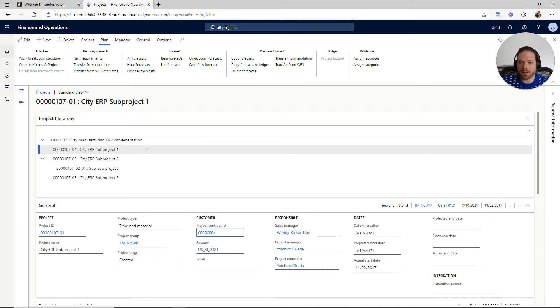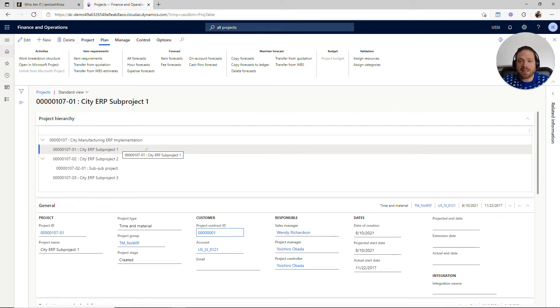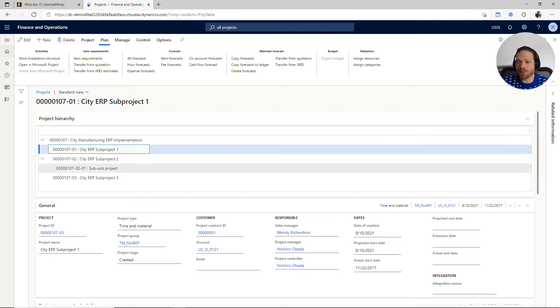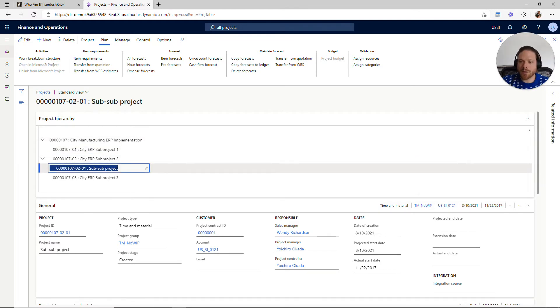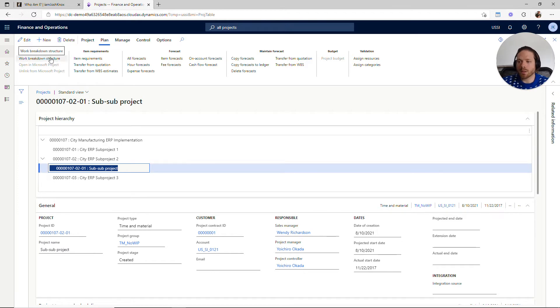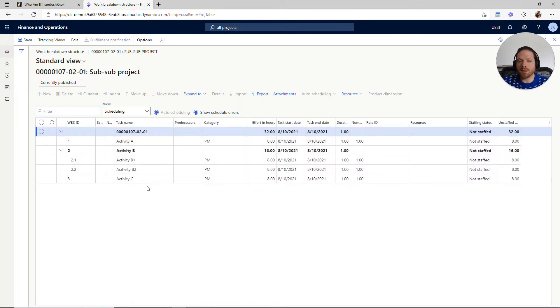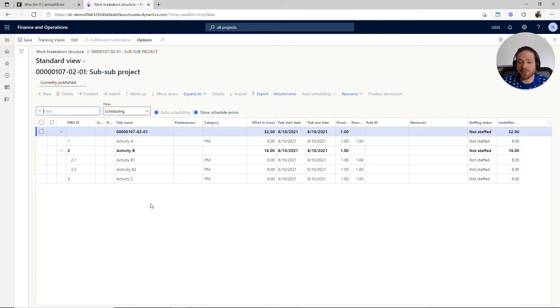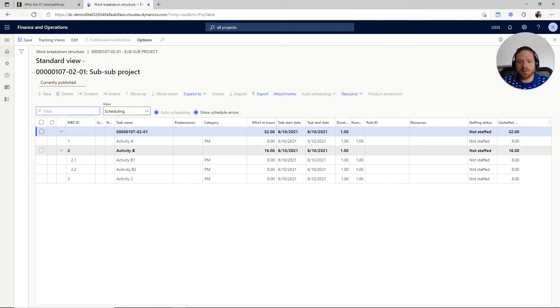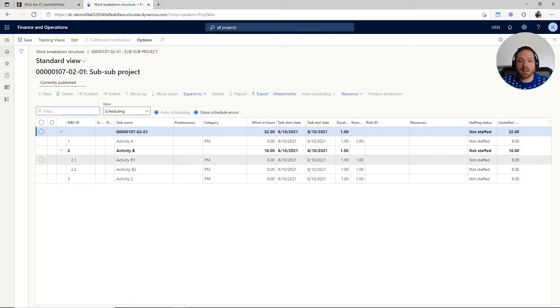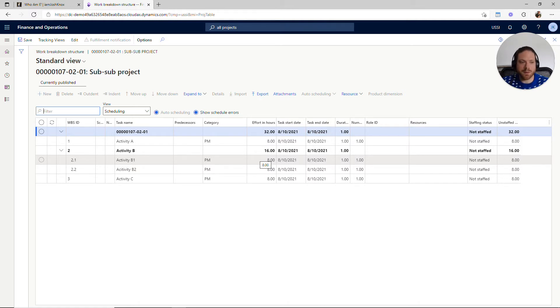And you have this sort of limited Russian nesting doll situation where you can create a sub-project of your main project and then a sub-sub-project all the way down. And then even within a sub-project you have a work breakdown structure that allows you to break down what's happening in that sub-project even more. So in a work breakdown structure I can create activities and sub-activities which allows me to more granularly forecast how different parts of my project are going to take place. I can do resourcing from within the work breakdown structure on the given activities—all of those are options.